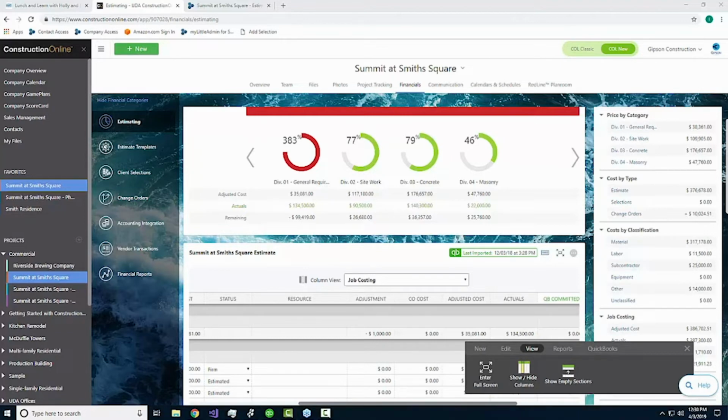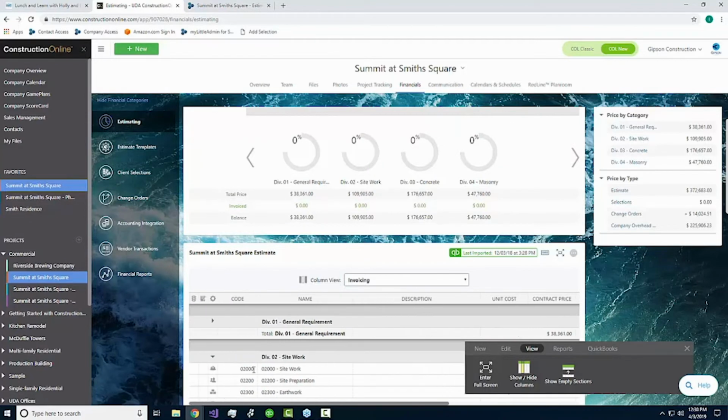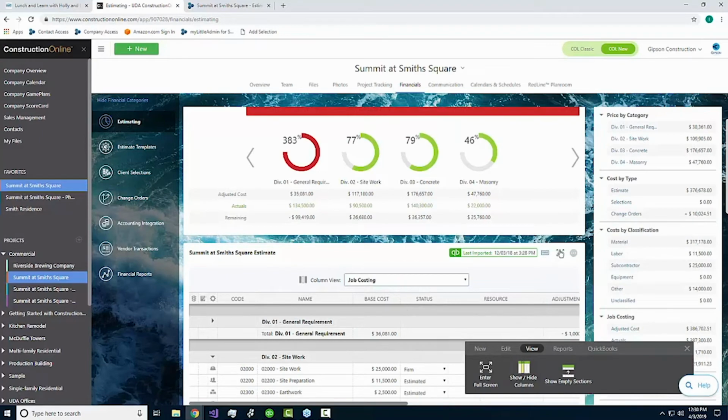We weren't really going to touch on those today, but I really wanted to highlight how useful up-to-date job costing and up-to-date invoiced amounts are when you're actually working through project to project. It really helps you prioritize projects that might need your attention, that might need a little bit extra direction from the top down to make sure that you prevent going over budget on other sections for projects. This information lets you make the best decisions with the best information on hand at the time, instead of finding out 3 months later that you went 380% over on your first division.